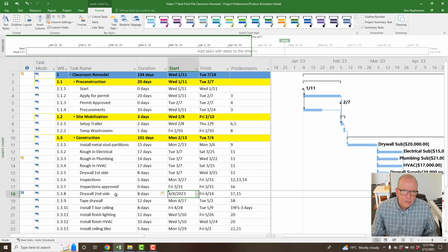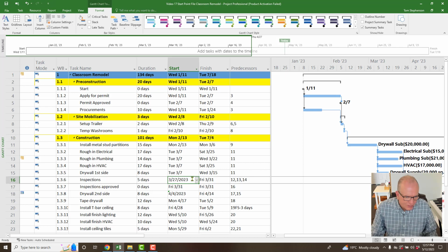Again, best practice, Project Management Institute: don't put constraints. Avoid them where possible. I'm not going to say never, ever, but it's too easy to put constraints. That's the problem. You start shortcutting things and just clicking dates. But what you're doing is locking yourself in. And so then, as we've talked about in updating in previous videos, things won't move and things won't behave the way that you expect.